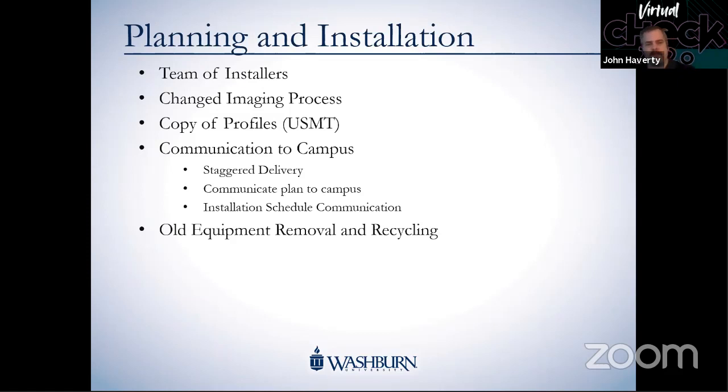That's where we take old equipment that's just going to be recycled. We're going to put systems in there like monitors, keyboards, mice, and computers that have no value, and those will be hauled off when we're done with this process. And we have another bin that we set up with CWG, the vendor we went through to do this process. Systems that did have some value, if we got some money from it on a trade-in or buyback option, we were putting in that other bin to do that process with them.